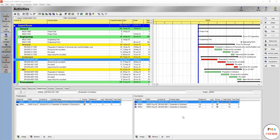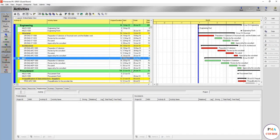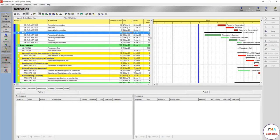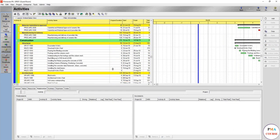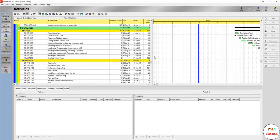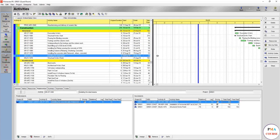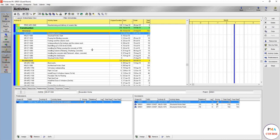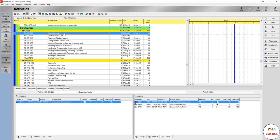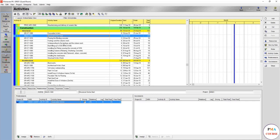Now it's time for the resources and adding the cost for every item. The system is the same, so we'll add the cost and generate an S-curve to see the selling price for each activity. For construction, we're not going to add man-hours, labor, and material separately. We're going to add the cost for each activity. I prefer to add it as a resource.